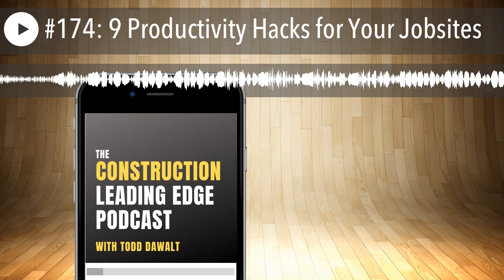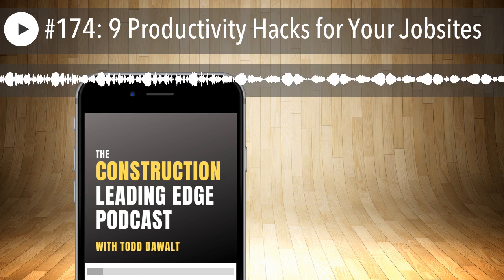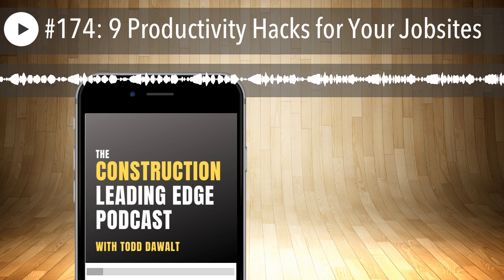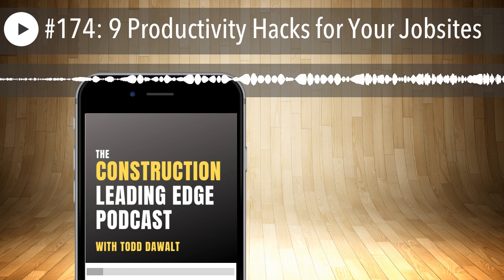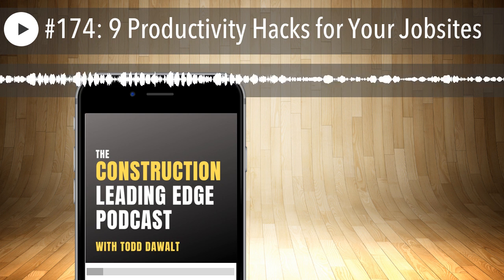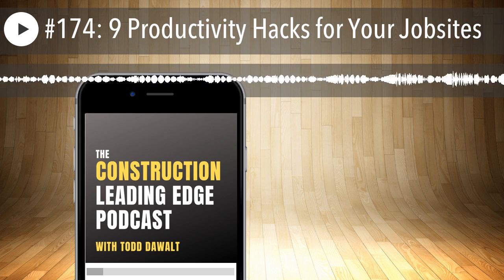And then the last tip is, this is the place that I start. When people bring me into their operation to do a 2-day deep dive because they're having profitability issues or projects are over schedule, over budget, there's chaos, culture's screwed up, people are frustrated. I've done that so many times that here's where I start. If somebody brings me in and they explain that they're having problems on their job site, I'll say, let's talk about your handoff, because that's where 80 to 90% of the problems come into play. It's where if you do a root cause analysis, you'll find that 80 to 90% of the problems on your job sites are the symptom of a poorly executed handoff.